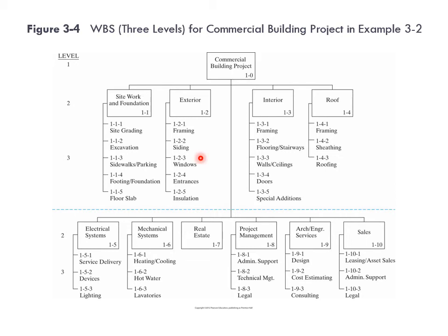By developing such a WBS structure, we can identify the relationships between these categories. We can use this as a bottom-up approach to estimate the costs. We can use WBS, as I said, to see the relationships between the tasks, the content and resource requirements for a work element.